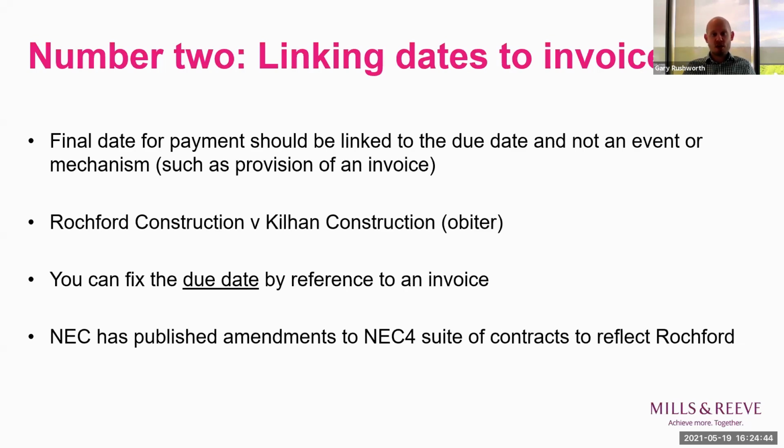But the key point you need to note is that you can't link the final date for payment to the provision of an invoice. And that's because the Construction Act requires that the final date for payment will be a fixed period after the due date. And part of the rationale for that is that it provides certainty as to when a pay less notice is required. And as noted in the slides, this was addressed in the recent decision of Rushworth and Kilhan.